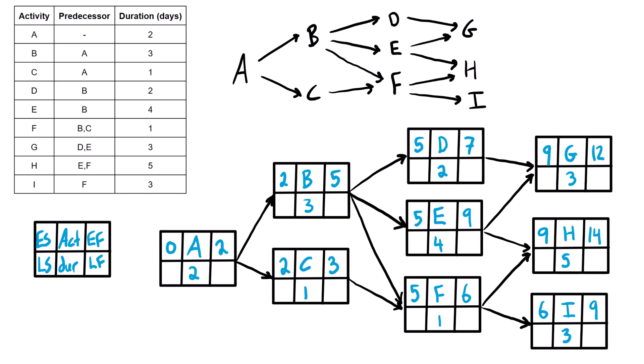Now we find ourselves with three finishing activities — G, H, and I — all with different early finishes. We take the largest, which is fourteen, and set that as the late finish for all finishing activities. So fourteen goes into the late finish of H, G, and I. Working the backward pass, we subtract each activity's duration from its late finish to get the late start: fourteen minus three is eleven for G, fourteen minus five is nine for H, and fourteen minus three is eleven for I.